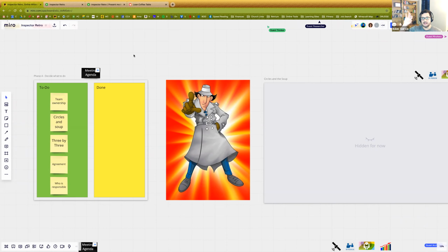I would close and do some kind of checkout, we'll talk about this, to make sure the team leaves feeling like they know where they're going and what they're doing next. So we'll talk about checkout. So what I would do is 5 minutes of just lost time, 5, maybe 10 minutes on the intro, 10 minutes, maybe 15 on what are we talking about, 15 to 20 on how do we zero in on the experiments we want to run, 10 minutes on deciding on what to do, and then 10 minutes on your closing, and that'll give you a little bit of a buffer to get out of the meeting and not go over. By the way, don't go over, because these teams, if they're really busy, they'll have something else to go to.